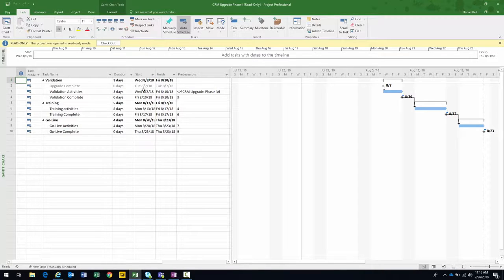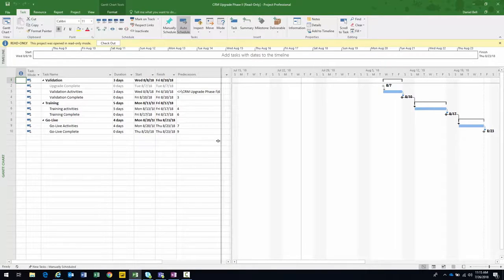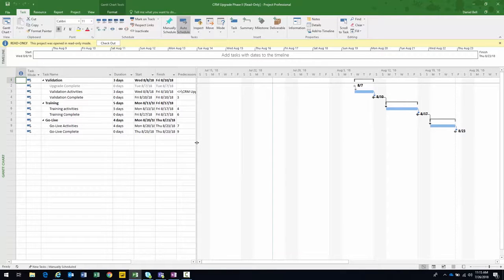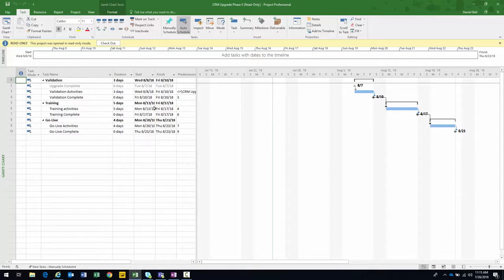The start date is now August 8 — everything got delayed by a single day, which ultimately changed the end date of the project. That's basically the relationship in action: inter-project dependencies allow you to save the projects without the master project and see how date changes between the two projects affect each other.